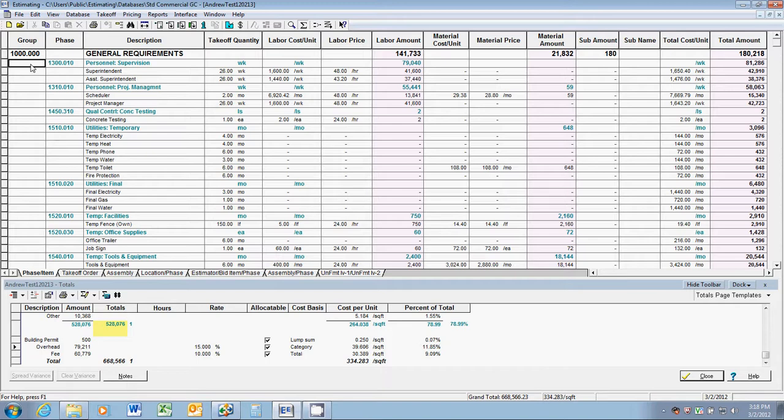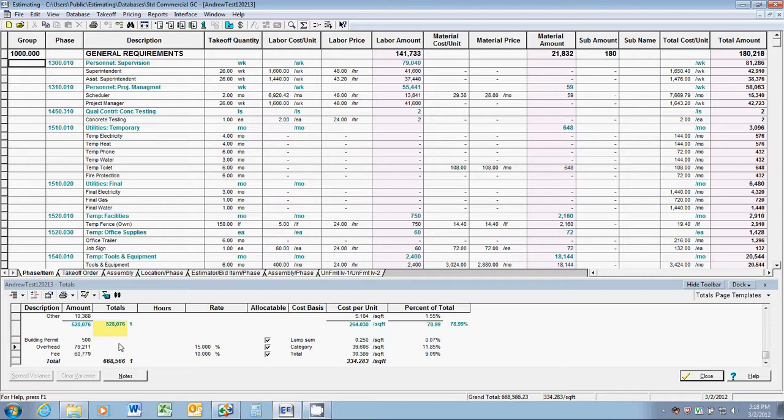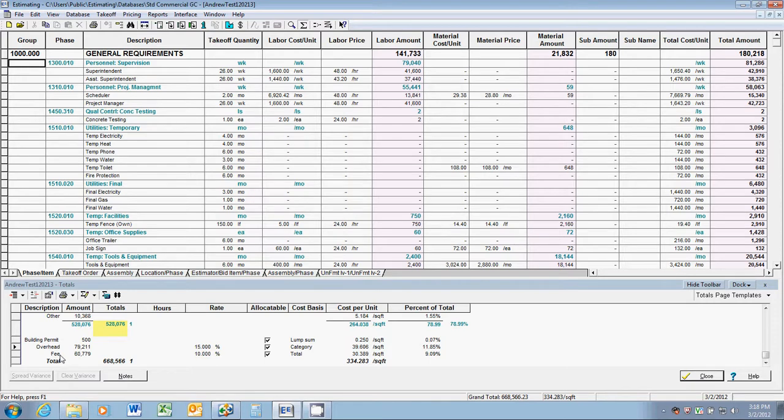Looking at this estimate spreadsheet, you'll see that we've estimated this project at about 26 weeks. Down here, highlighted yellow, you'll see that our cost on the project is $528,000. Our profit or fee is about $60,000. Combined with our other add-ons, the total bottom line is $668,000, almost $670,000.